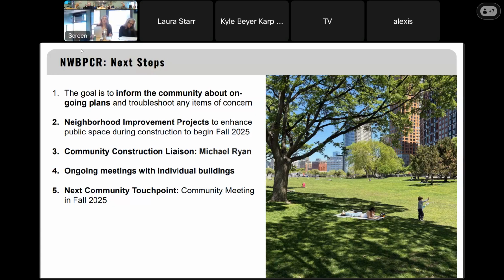We initially understood at the South Project that there would be phasing and that it would go area by area so that the construction would move. In the end, that is not how the project was determined to be. And everything was leveled all at once, and it was one giant site because that needed to be done. But that actually didn't make it any easier for the people who thought, well, we're going to have this section here. No, this section is now needed for construction vehicles. This section, even though it's right by people's homes, is used as the storage space and the incoming, back and forth of trucks and things like that.